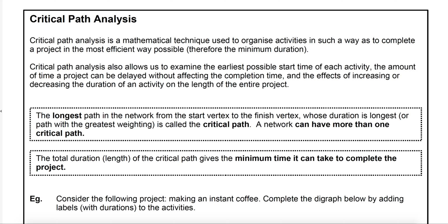So we want to know how long it takes for an activity to finish. And when we do that, we talk about a minimum completion time. So what we're saying in those cases is, at best, what's the shortest amount of time that this project will take? Now, obviously, in reality, quite often projects will take longer. Things will be delayed. There might be, say, rain, so you can't do a certain activity in the wet. So then the activity network or the durations will change.